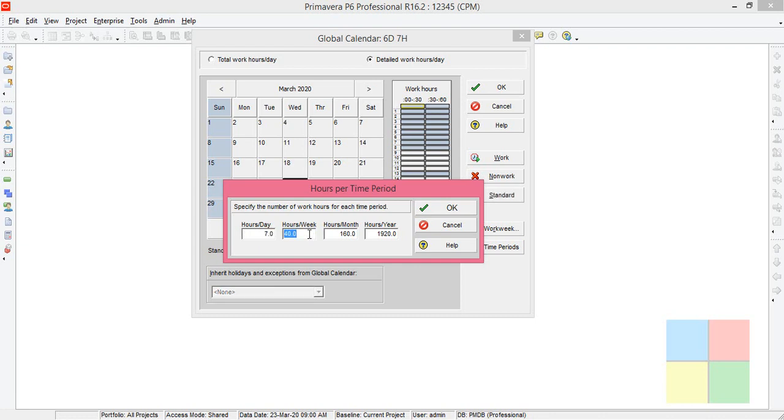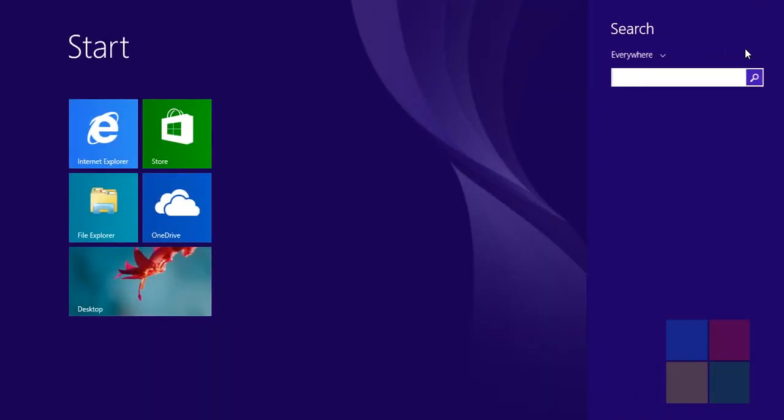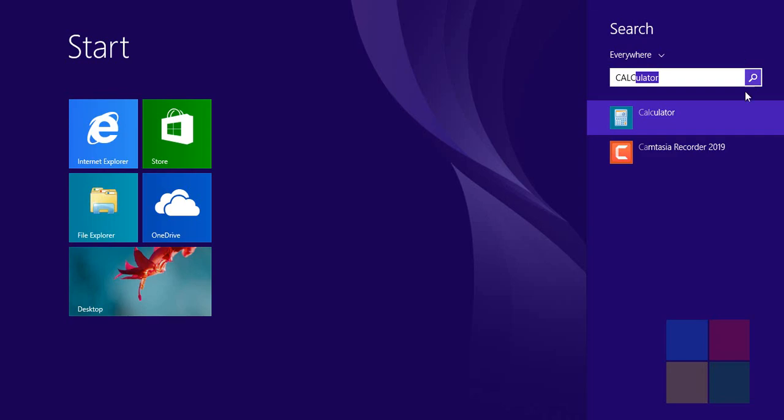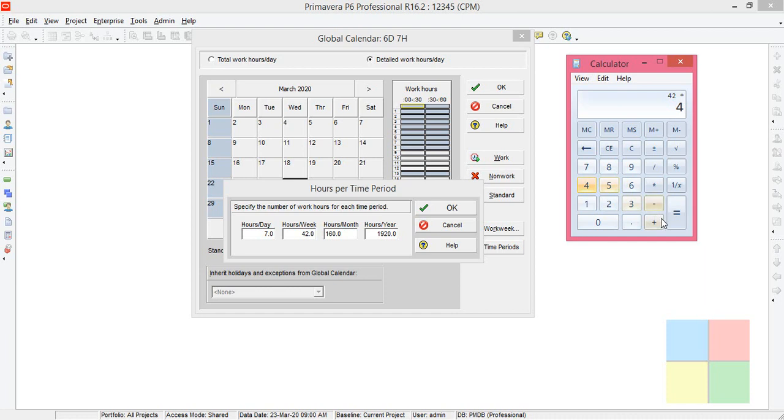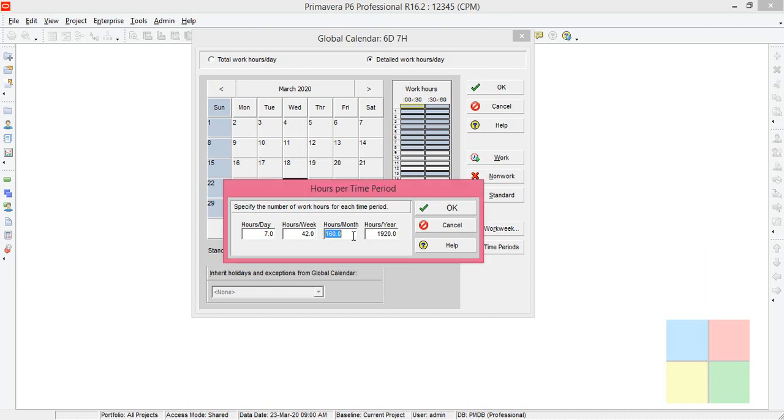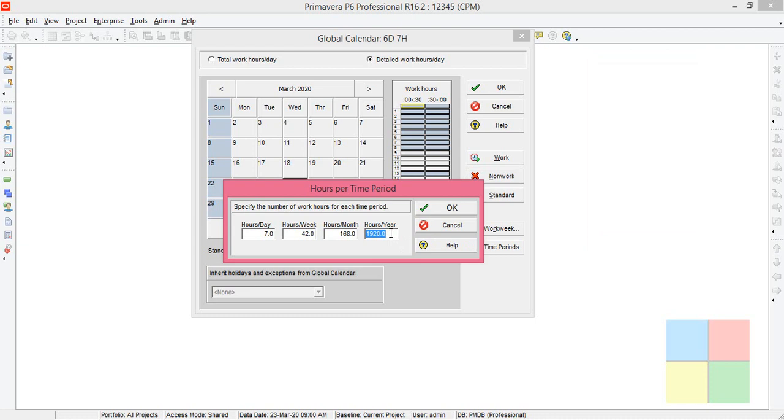Per week it will be seven into six, daily seven for six days, which will be 42. Monthly we are considering four weeks, that is the standard that we follow in Oracle Primavera. So 42 into 4 will be 168. Again 168 into 12 should be 2016. Click on OK.